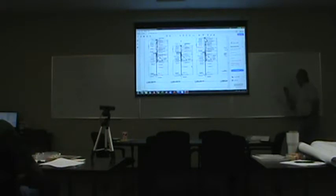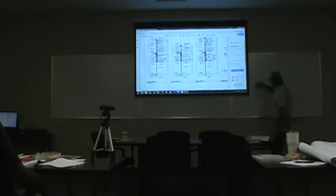Okay, so intuitively, you would know that the metal stud guy on this activity to get ready for the roof is what? The critical path. Do you see that? Why? That's 3 days. That's 10 days. That's 1 day. Early start. Early start is 9:30. Early finish is what? 10:10. See, I always use September. 30 days has September. That way I don't have to subtract one. Okay. All right. What's my late start? 9:30. Yep.